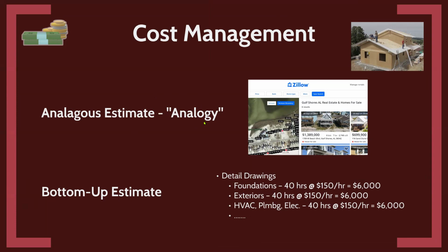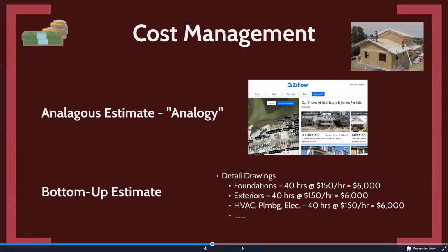It was a 2 million gallon per day pump station, and it had a footprint of however many acres. And so we can extrapolate from past projects. Past projects are analogous too. And that's a fast and easy way, right, to estimate costs.